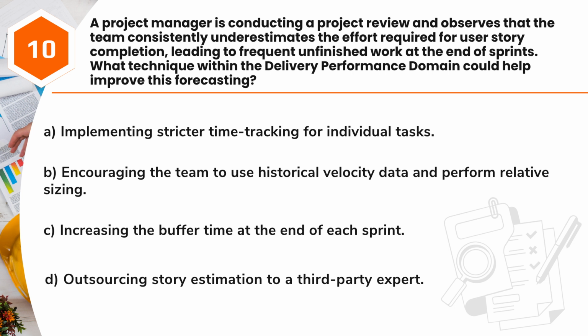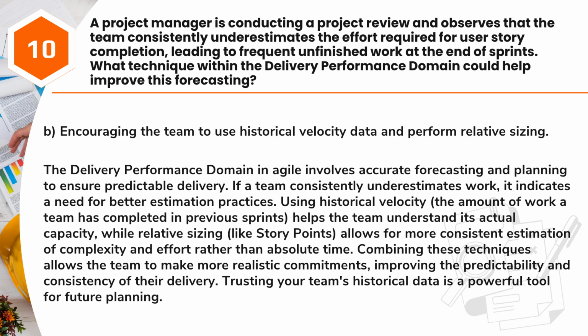A. Implementing stricter time tracking for individual tasks. B. Encouraging the team to use historical velocity data and perform relative sizing. C. Increasing the buffer time at the end of each sprint. D. Outsourcing story estimation to a third-party expert. Answer: B. Encouraging the team to use historical velocity data and perform relative sizing.